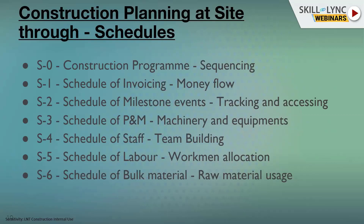There is a construction program - this refers to your birthday celebration. The birthday date was 22nd July, so from the morning of 22nd July she starts her preparations for the evening celebration. There is a sequence of work she has planned: as per the cooking recipe she needs to soak dal or rice one day before, so on 21st night she soaks those things. On 22nd morning at 8 o'clock the maid comes, vegetables are cut by 12 o'clock, the first dish is prepared by 3:30, and by 6 o'clock all dishes are ready. Dishes that need to be served hot are planned at the last. This sequencing, in terms of MSP or sophisticated project management, is called the construction program.